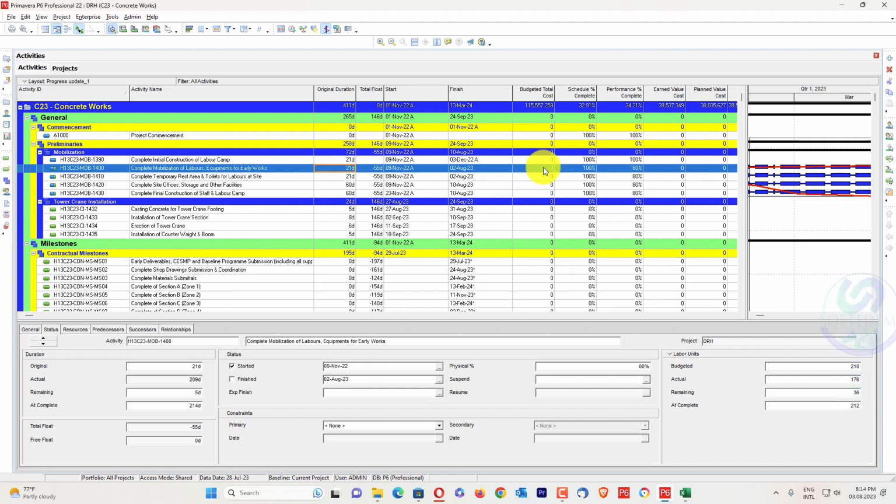For a revised schedule, you must have an extension of time or something which records that you have a new finish date. There may be a change in scope of work, some additional scope of work, or some de-scoping, a decrease in scope of work. So a revised schedule can be created on an increase or decrease of scope of work, and when your project finish date changes from any finish date, maybe ahead or behind.